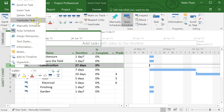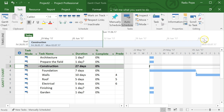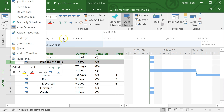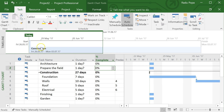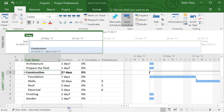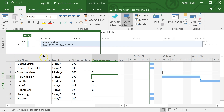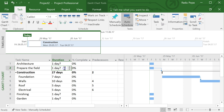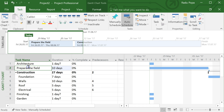Using 'Add to Timeline,' the construction stage now appears on the timeline bar at the top. I can add other high-level stages too. You'll notice they may overlap if no predecessors are set between them. If I define a predecessor — for example saying 'Prepare the Field' takes ten days — then construction will only start when 'Prepare the Field' is done, and they won't overlap.